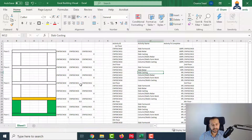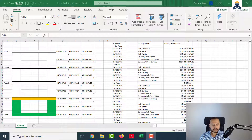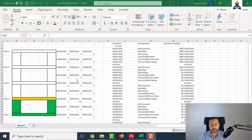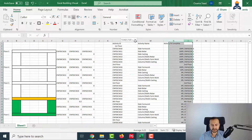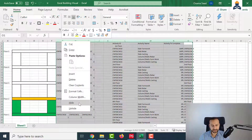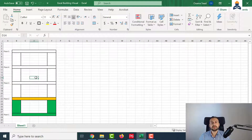You do not have to do anything manually here anymore. You only need to invest the time in building the sheet once. Once you have done it the way I showed you, this is how you can extract information and show the visual presentation of the building. Of course, if it's a big project, it will be very helpful because you do not have to go and manually update the colors. You can apply it in a bridge project, a tunnel - I did it only for a building but it applies everywhere. You can customize it, hide all this extra information, and this is your report, ready - right after your Primavera update.